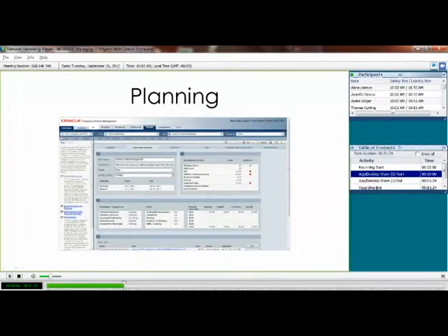He has this application where he's got the ability for his team members to put information into the forms section. So whenever a potential project or a demand for a project comes in, the team can enter some key information into the forms part here, whether it be a financial summary or the strategy or the risk components to it. Capture a lot of this demand coming in and then be able to evaluate which project moves forward.